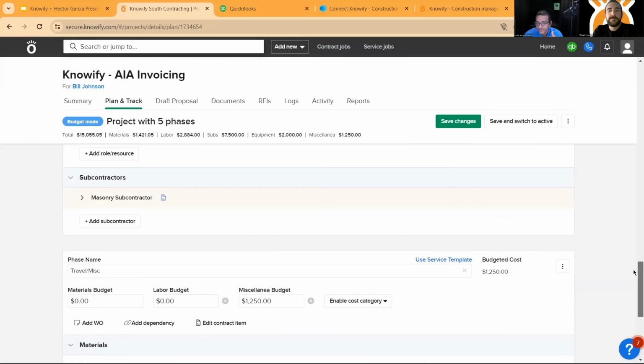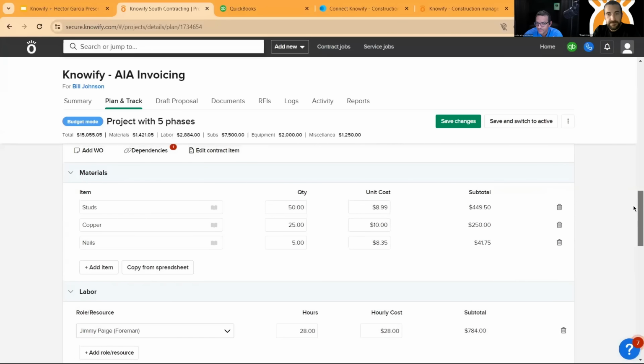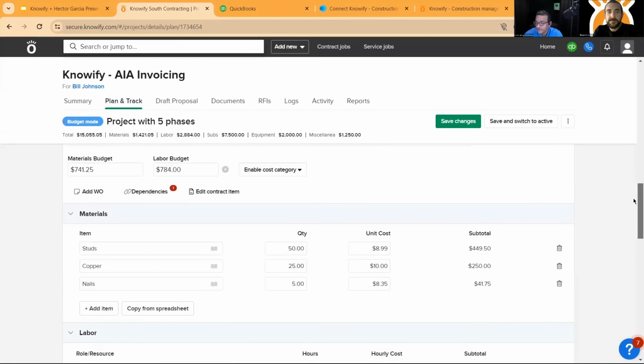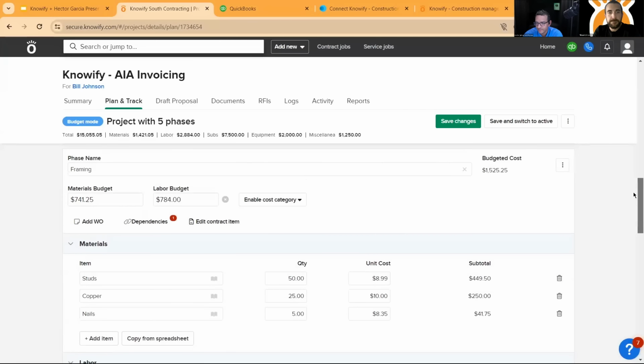And again, including equipment that we're maybe not paying for. We already bought it. We bought it 3 years ago. The equipment is sitting there. Maybe even labor that you're not paying for, like the owner's time or something like that. So the idea is to get real fair market value of the cost of doing this job, regardless of whether there is cash coming out of your pocket or is going to use an internal resource.